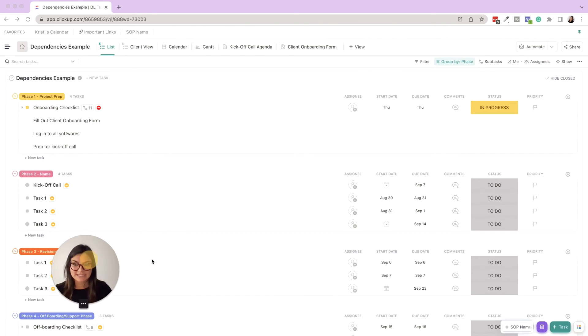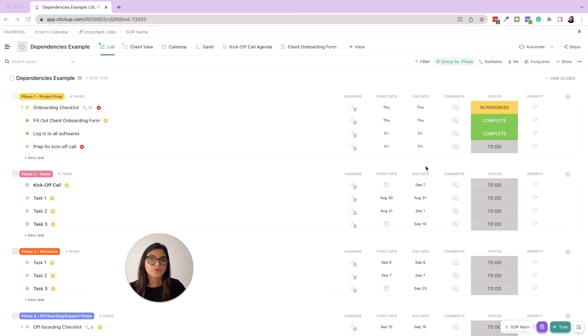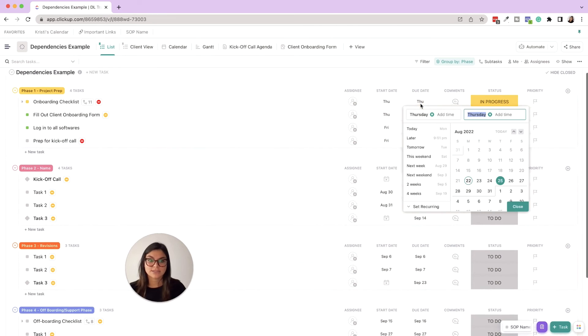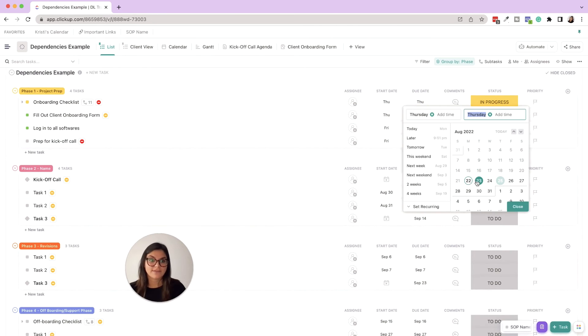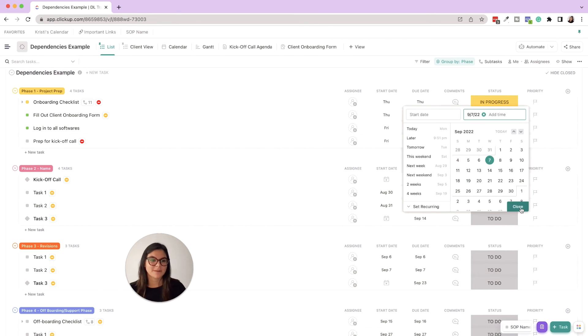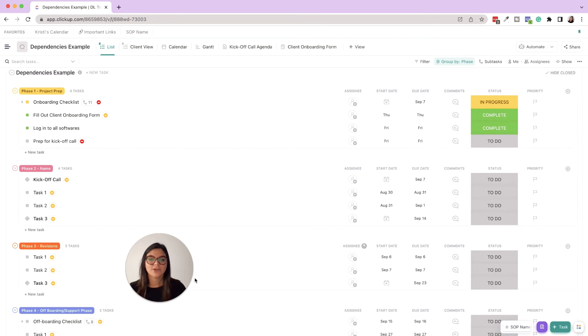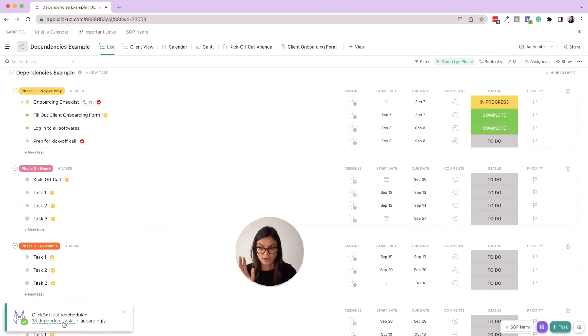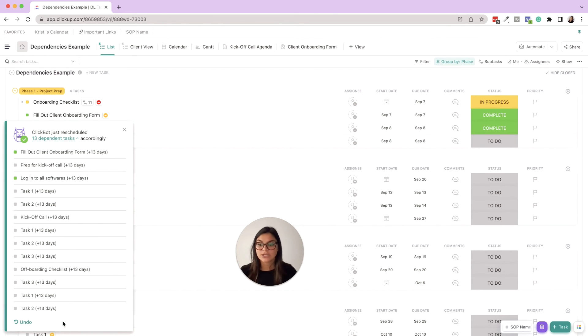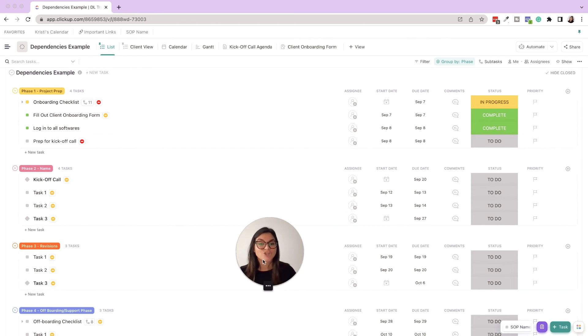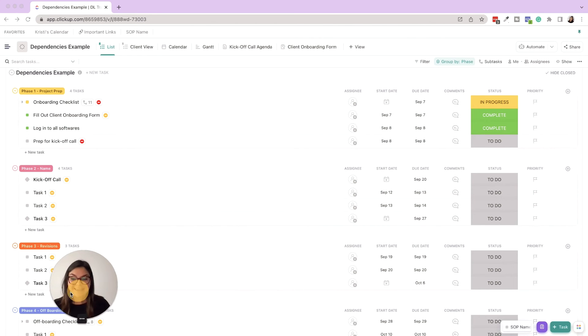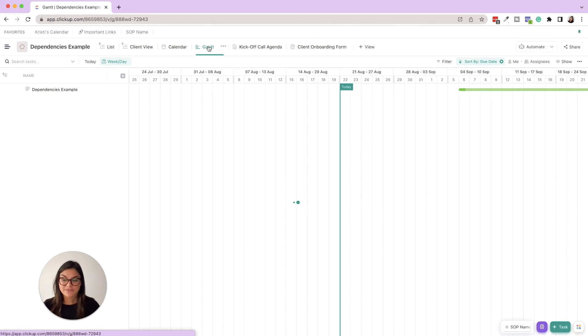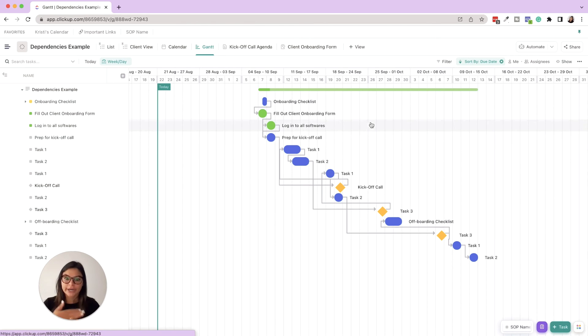And now note here as well - you don't have to remap the dependencies in Gantt view. You can just see if I changed this due date of the project kickoff to, let's go ahead and move this to September 7th, watch what happens. ClickBot just rescheduled 13 dependent tasks and reassigned all those. So now I could always undo that if I'm changing a due date and I'm like I don't want it to move all the other things, but you could also see what it's moving.